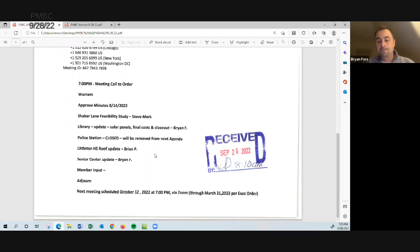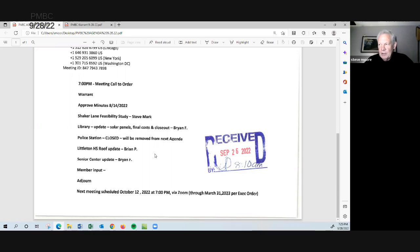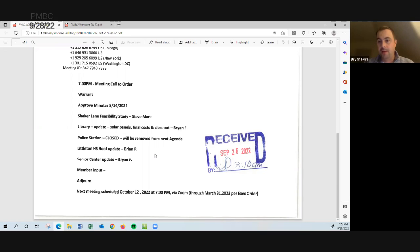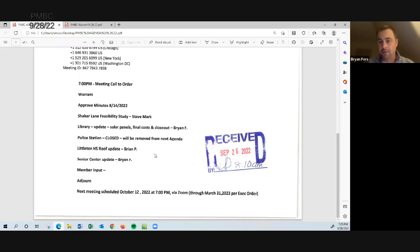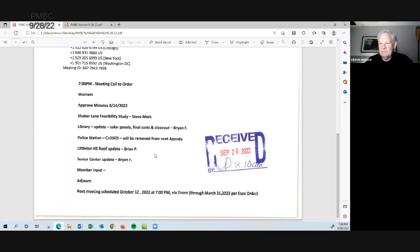Ultimately when they get on board and Steve, I would ask this first, a representative from the CM, if they wanted to come and sit down and if there was anything that needed to be spoke about, obviously it would be in their contract that they would be obligated to come in and provide us some updates as well. Good. Okay. Now, as far as the interview process, that's typically the selection committee. But if Anthony has excluded himself from the review part, is he still eligible for participation in the interview? So the, my answer to that, it would be no. But anyone and everyone is available to come to the interviews and watch the interviews and participate and provide their input. The selection committee has been established before this, and it'll be those four members that ultimately do their rankings and provide their evaluation on who they're selecting for this job. Okay. Thanks for the clarification. Yep. Any other questions on the senior center?